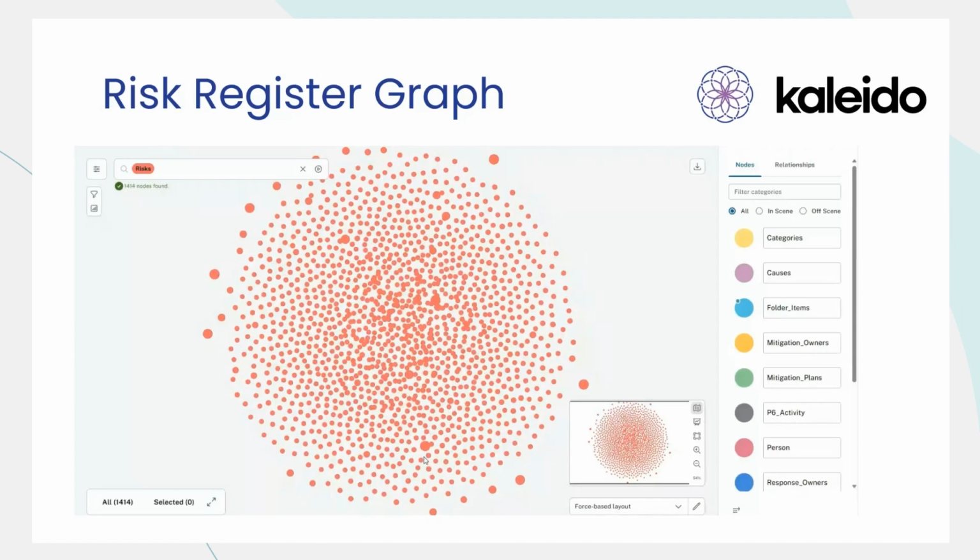The schedule database, or P6 database, as it's sometimes referred to in the industry, is a market-leading tool. It contains all of the key activities and milestones within the project. It provides a comprehensive overview of the project timeline, including start and end dates, task dependencies, resource allocations, and critical path activities. And this database allows us to monitor the project's progress.